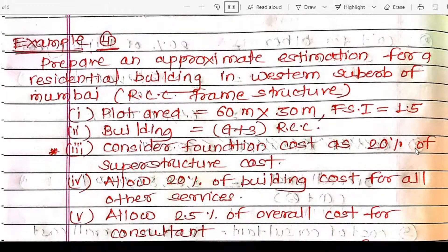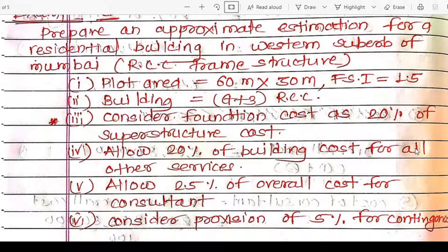We will now see another problem: prepare an approximate estimate for a residential building in the western suburb of Mumbai, RCC frame structure. The plot area is 60 meters by 30 meters. The FSI is 1.5. The building is G plus 3 RCC. Consider foundation cost as 20% of the superstructure cost. Allow 20% of building cost for other services, 2.5% of overall cost for consultancy, and 5% for contingency.